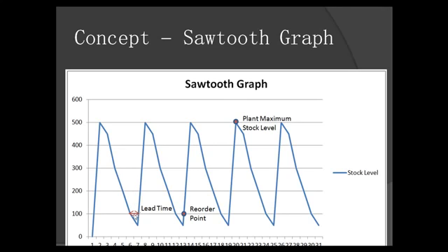And you would need a time to convert it into a purchase order and send it to the vendor. The vendor will separate the material, the goods, and send them to you. We call it lead time, which means the time from the purchase requisition creation until the goods receipt.